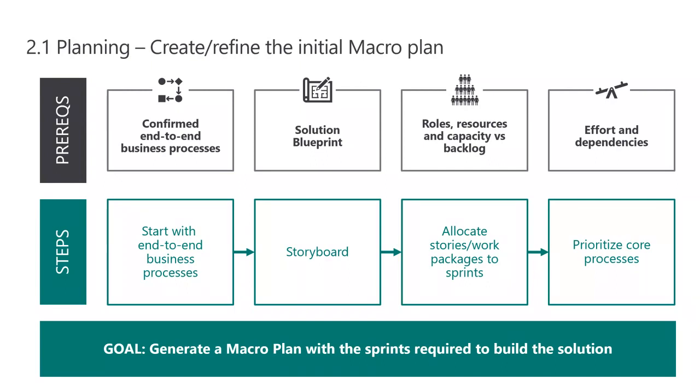You've got maybe one level below broken down into level 1, and then one more level down at level 2, say, and you're mapping those out on a board. Start with something simple and say, this is the sequence in which this is going to get delivered. I'm going to start with this process, which is core. This is what 80% of the time we do.